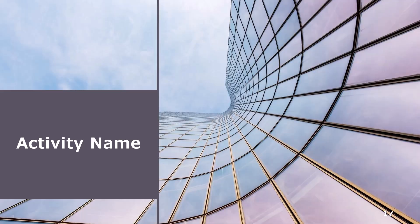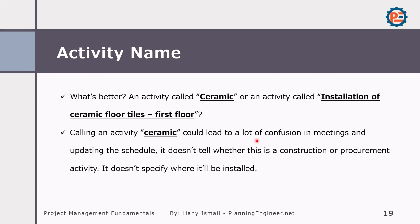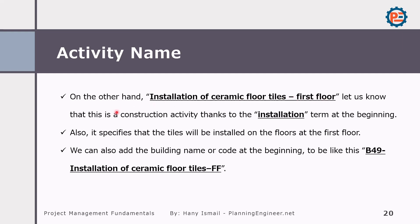Now for the activity name — it is important to have a very clear activity name. You cannot call an activity just 'ceramic' — that is not sufficient, no level of detail is provided. Instead, call it 'Installation of ceramic floor tiles, first floor.' This is more specific and gives the reader the required information. The term 'installation' also specifies this is a construction activity, not a shop drawing or procurement. You can also add the building code like B49 to reference a specific building.